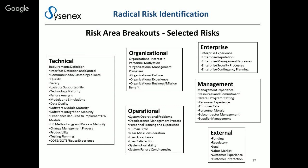I was working on a launch vehicle program. The engineers and I were working with the payload accommodations, the shroud, and basically the top of the launch vehicle. I came on to the program, and it took me a few days to figure out that nobody had thought about how we were going to mate our part of the launch vehicle with the rest of the launch vehicle. Some of the designs were already 2 years in. I was able to choose my area, and so I started working on that. Several million dollars later, and a very expensive, very elaborate piece of GSE later, we got it done. But that's a big oops with people that should have known better. Good question.